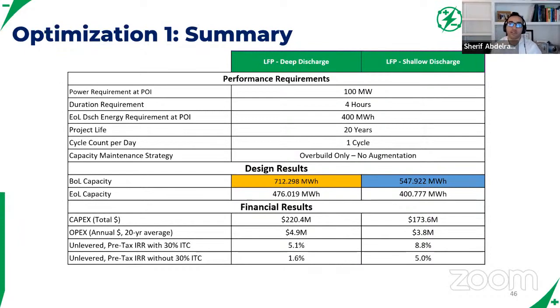Because at the end of the day, probably all the developers on this workshop are going to be very familiar with this process. When you go out and you're purchasing the battery system, you're talking to Samsung, CATL or any of the new integrators, the first thing they're going to ask you is, can you give me a battery usage profile? How are you going to use this battery? And then they're going to give you a performance guarantee.